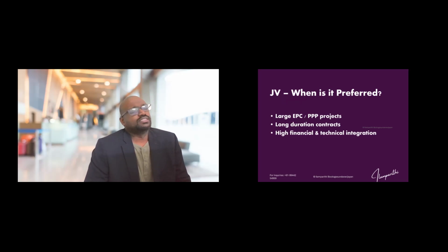So when is a JV preferred? Usually in large EPC projects, when the project duration is very long and when high financial and technical integration is required, they go for a JV.